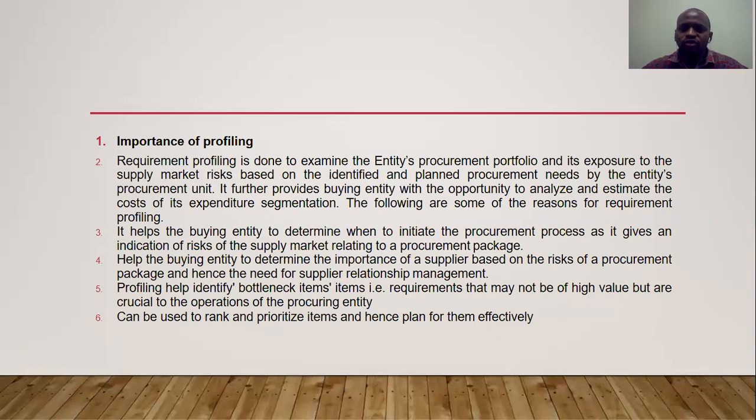So what are some of the importance of profiling? Number one, requirements profiling is done to examine the entity's procurement portfolio, and it exposes the supply market risks based on the identified planned procurement needs. So you're able to understand some of the risks that are associated when you're procuring certain items into the organization. It also helps in ensuring that the buying organization is able to determine when to initiate the procurement process, indicating the various risks that are very critical in relation to the procurement package.